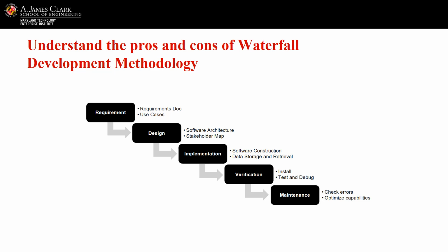If your company is using a Waterfall system, the best thing you can do as a product manager is validate the PRD as much as possible initially to prevent changes later, and try to learn quickly if the market likes your idea. In most cases, Waterfall's shortcomings outweigh its benefits. Many software teams, including that of the Department of Defense, have since switched to more iterative development approaches. There are numerous ones with various names, but eventually you'll encounter the second main development methodology, Agile development.